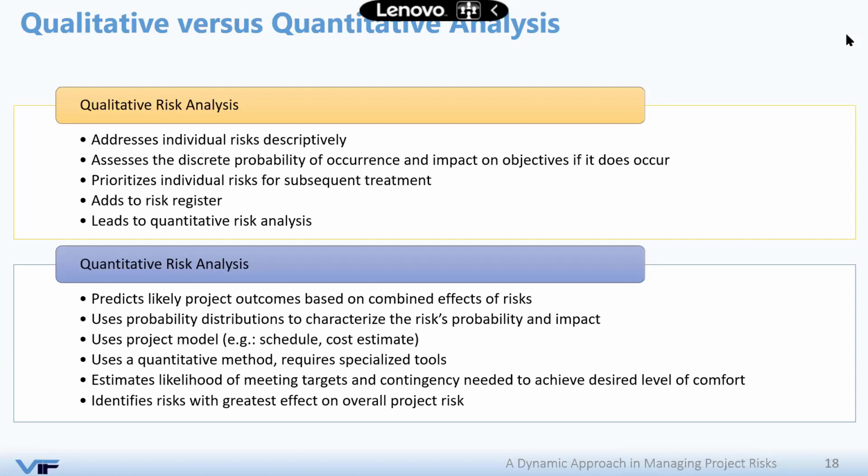But qualitative risk assessment cannot give you the overall project risk score simply because you're not dealing with numbers and you cannot sum all the individual risk scores. But it will help you definitely to see if you need to do quantitative or not. It will help you to do priorities about the individual risks. So not all risks that are listed on the risk register we need to do on them quantitative. Your decision might be, out of the 100 risks you have, I'll have 50 risks or 60 risks that I will assess qualitatively, but there are some important risks to me that I will do using quantitative risk analysis. So it's not on or off. It's not, either I move completely with qualitative or quantitative.